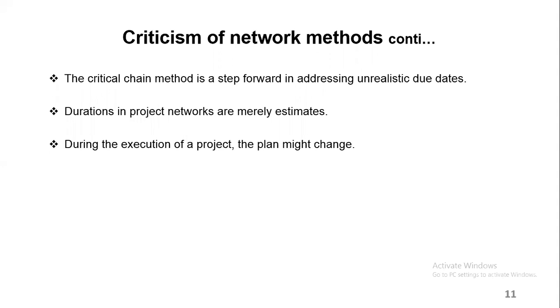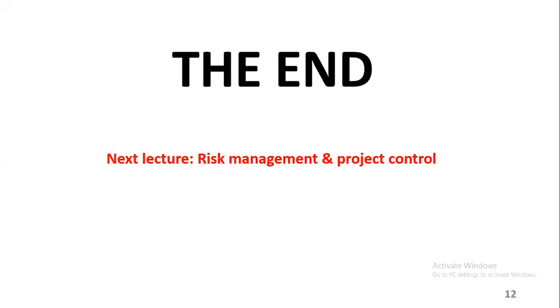That's why sometimes when you are giving those estimates for the duration, you need to give some sort of contingency. Let's say you just add a few days, just in case something goes wrong. A few days for control. Okay. Precautions. We come to the end of this lecture.